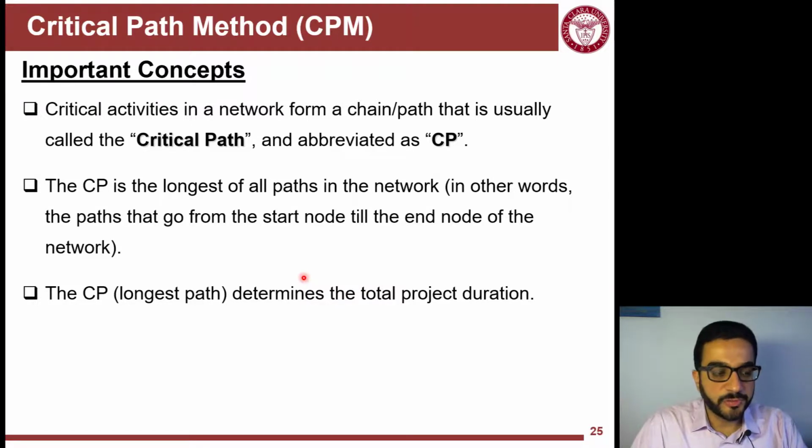That concept is also applied in transportation engineering and traffic. If you have an origin and a destination and you want to go, you are looking for the shortest path. So in traffic, if I'm driving, I will look for the shortest path. But in scheduling, I'm looking for the longest path because this is the one that's governing the project duration.